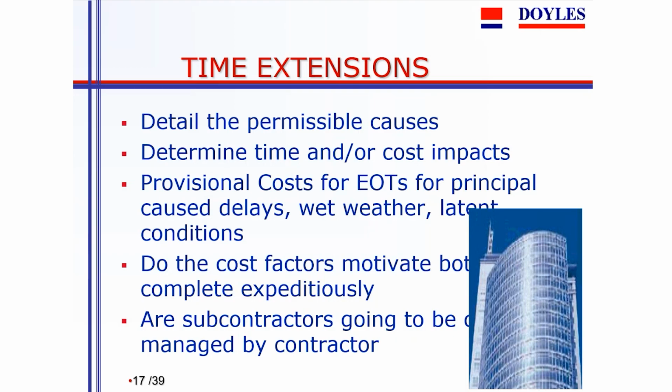So in terms of the best sort of approach to it, it would be better to say, please allow for 20 days of weather extensions, after which there'll be an extension of time. It's not traditional to give cost during weather, but at least the extension of time after a certain provision should be available, in which case then the contractors tender on a common basis.